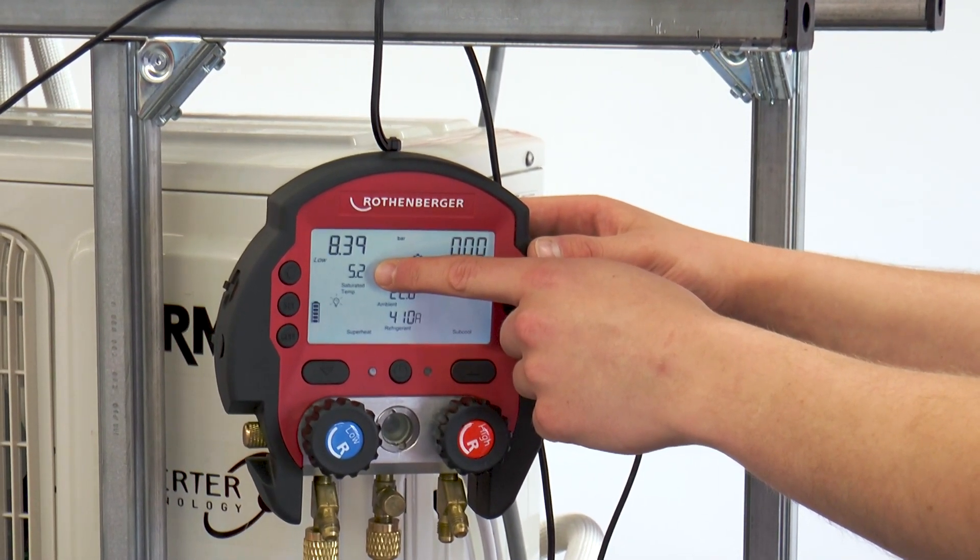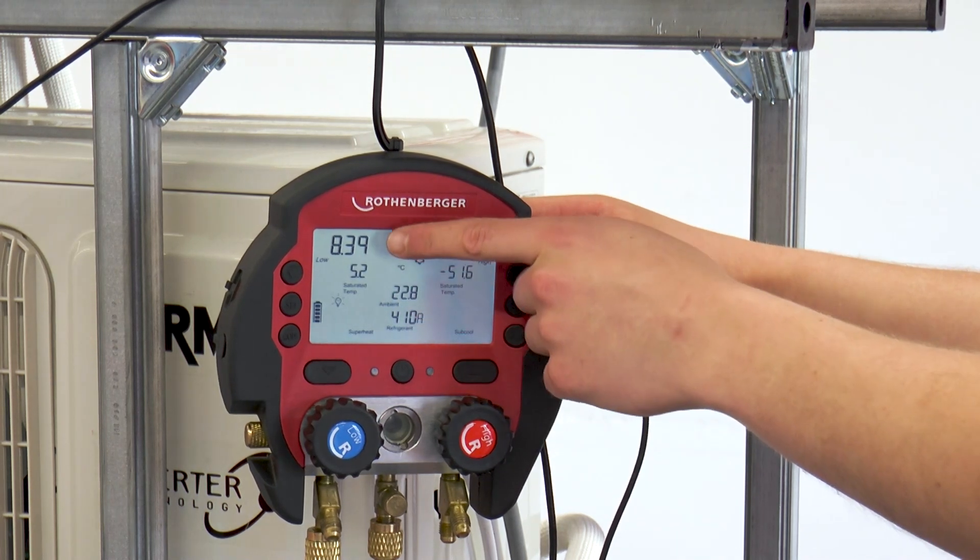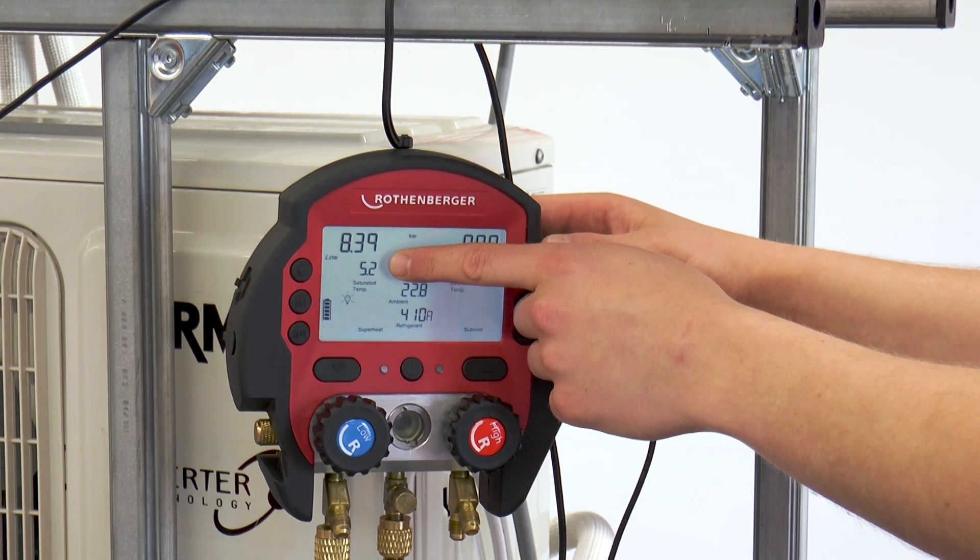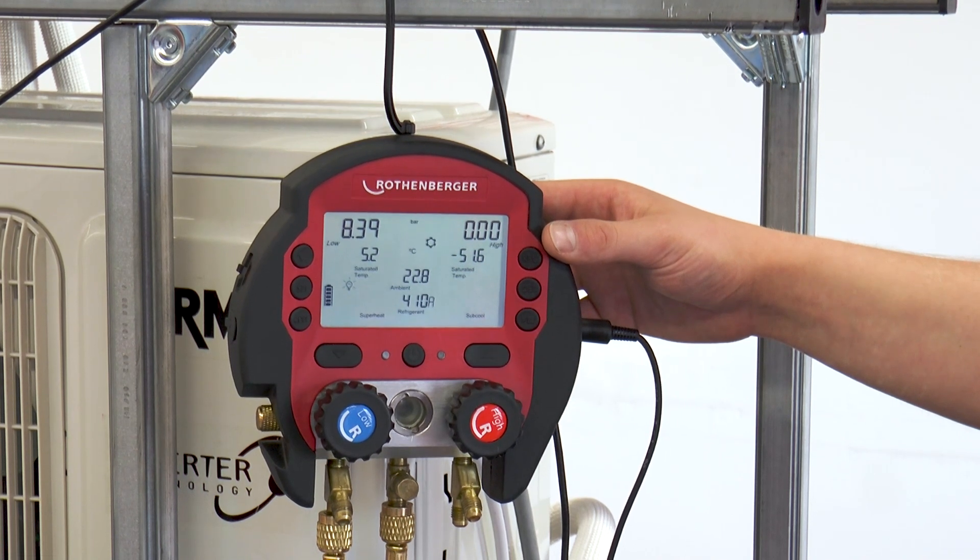And from this, the required test pressure for the leak test is derived. Here it can be seen that the refrigerant R410A is associated with a saturation temperature of 5.2 degrees Celsius at the pressure of 8.39 bar.